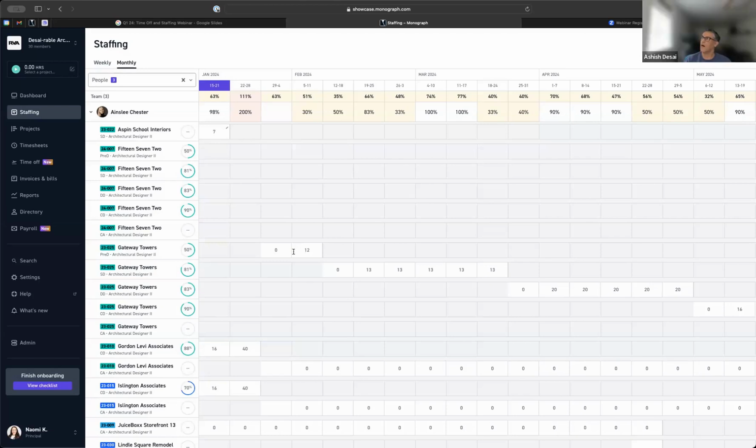Good question. Thinking about, okay, so there are a few different things that come to mind. You could potentially, that's probably not a good idea. So probably the simplest would be to adjust people's compensation hours. If it's the same fixed time every week, so let's say they work 40 hours a week, but you have kind of a standard meeting of 2.5 hours, you could change their hours to represent 37.5 hours a week, and then everyone's capacity that's shown here upon a hover would, instead of saying 40, would say 37.5.